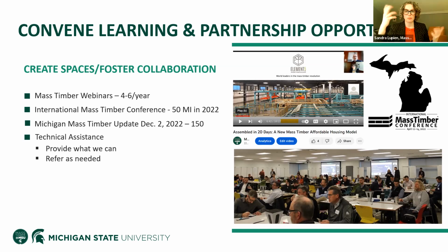One thing that we're able to do, for example, is provide some technical assistance around building code. So we had a project in Michigan that was in design, and the architect team was about to submit it to the local authority having jurisdiction, and they did that. They did a preliminary with them actually. And the authority said, I really have a lot of problems with this mass timber. We've never done this before. It looks like your building is aligned with the Michigan Building Code, but there's this statute from 1936 that pertains to schools. This was a school building. And I'm interpreting this as saying you can't use mass timber on this school project.